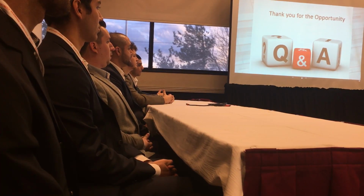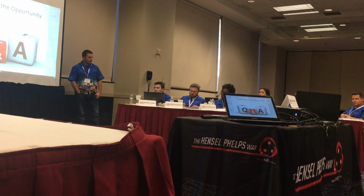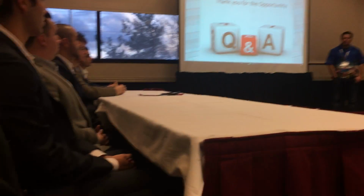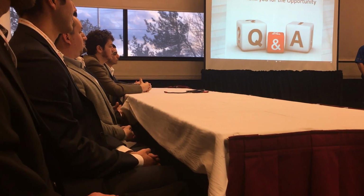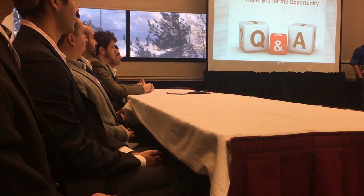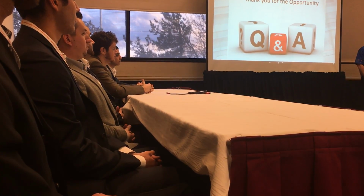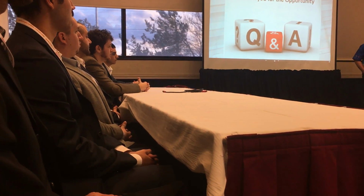Often when you carry out that meeting, say stuff's been here a while, like your framer, and you're bringing new people on, what? We'll require a once a week meeting with the foreman. Okay. And then we'll have a weekly work plan submitted to us, we'll review it, and then we'll go over it together with all the foremen, so all the foremen themselves know who's gonna be working where and what they're working on, and they can relay that to their crew.